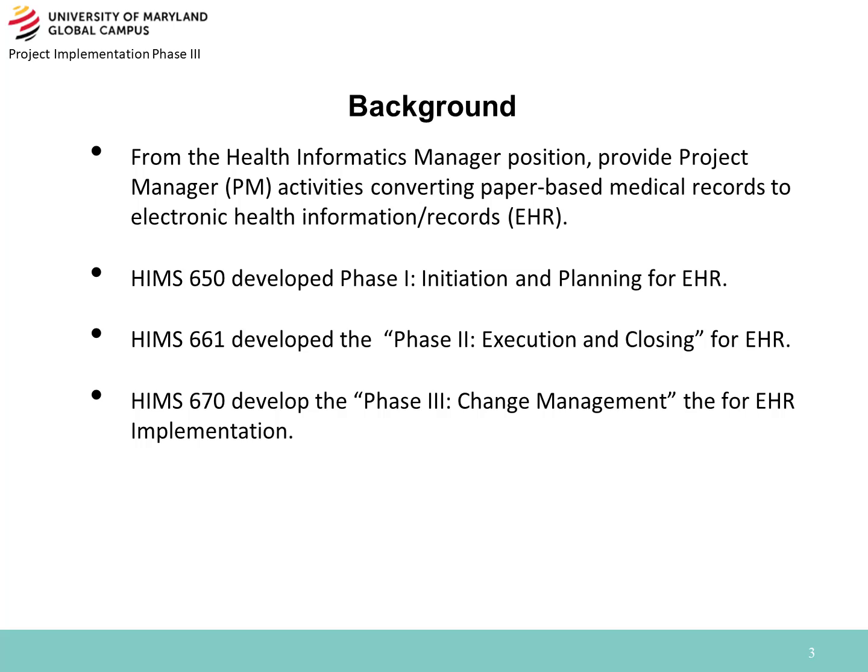In HIMS 661, we completed phase 2, the execution and closing of the project, and delivered the work breakdown structures, the system acquisition, including RFIs and RFPs, provided the EHR implementation schedule using a Gantt, outlined a communication plan with the stakeholders and team members, laid out the monitoring and controlling with scope, time, task, budget, and quality, outlined and executed the testing, the unit and integrated performance system testing, and then the closing and signing off of the project completion.